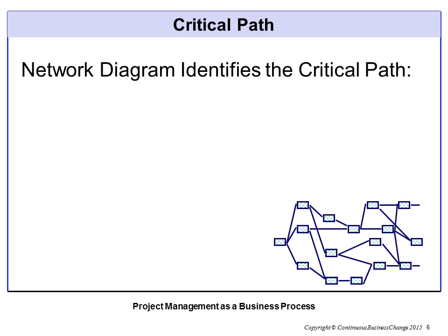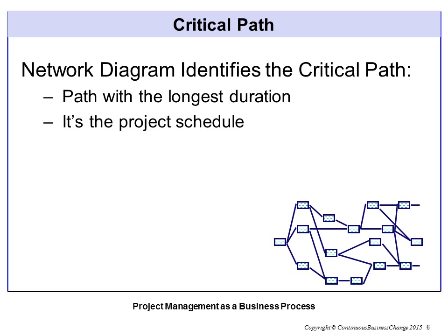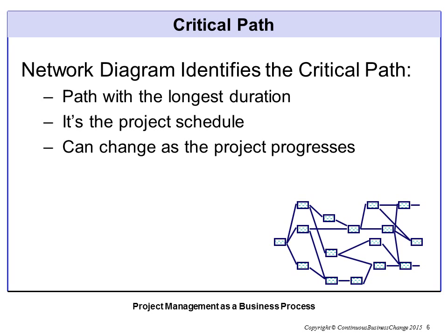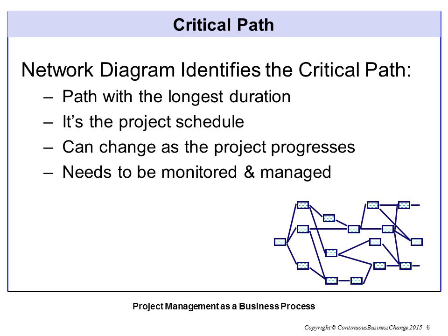The critical path in project management terms is not necessarily the English definition of the word critical. The critical path is the path with the longest duration. It is the project schedule. It defines when the project will end. It can change as the project progresses. It needs to be monitored and managed.